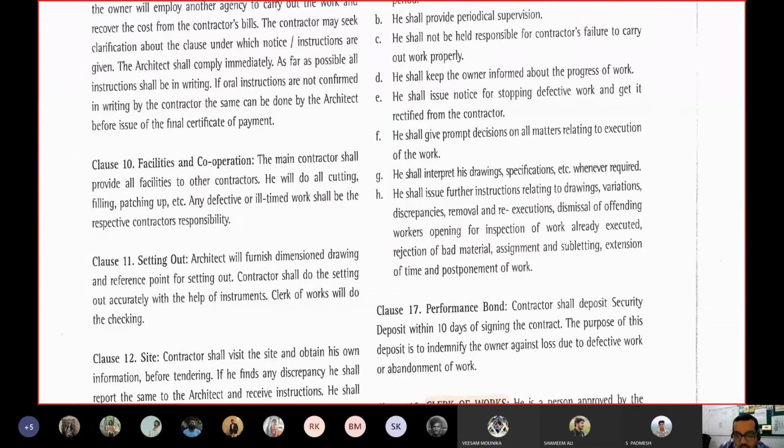So here the contractor who is submitting this performance bond during or after signing of this contract promises or guarantees his performance. So if you remember, before signing of a contract, there was one more security deposit, which was what? During submission of tender. While a tender was submitted, another amount of money was given as a security to find out only interested bidders or interested tenderers. Earnest money, sir. Earnest money, yes.